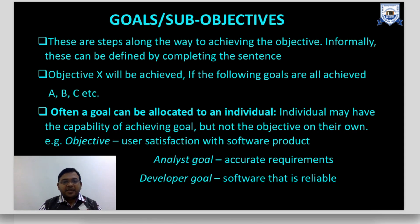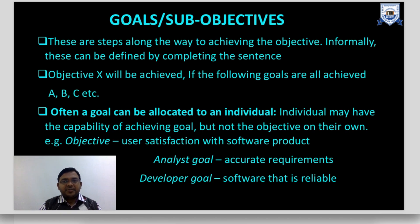Often a goal can be allocated to an individual — an individual may have the capability of achieving a goal but not the objective on their own. For example, the objective of user satisfaction with the software product: the analyst's goal is to take accurate requirements, and the developer's goal is that the software developed must be reliable. Goals and objectives should be linked — your objective should be achieved only when sub-objectives and goals are achieved.